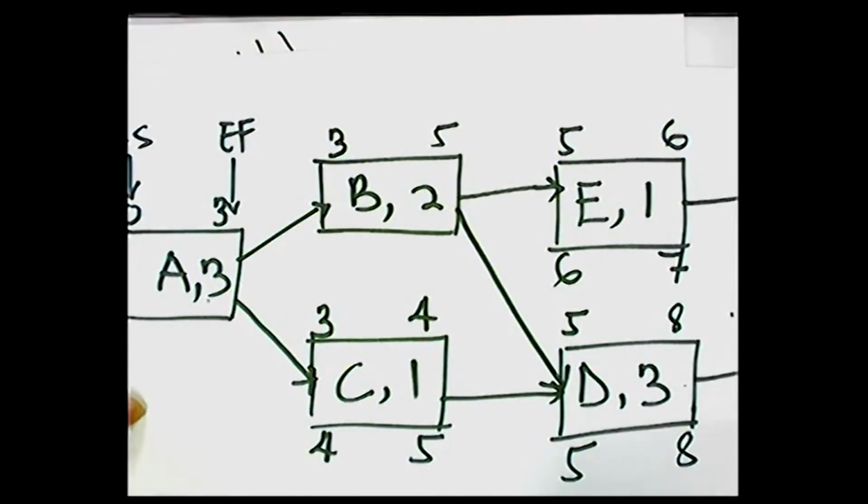Think about it. We said when we're doing the forward pass, we pick the highest, and the backward pass is the exact reverse of the forward pass. So the answer is obvious. We are going to pick the least. But what is the reasoning behind it?